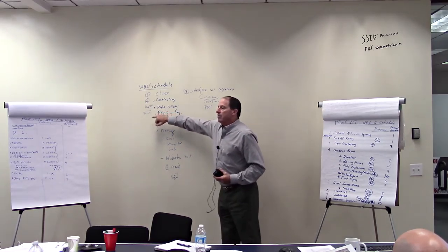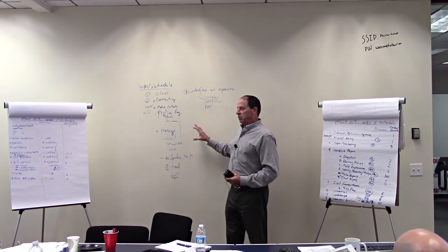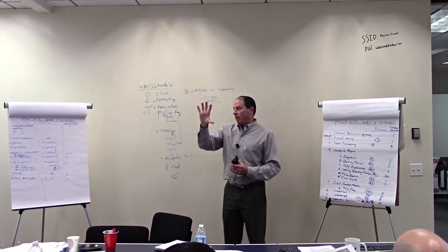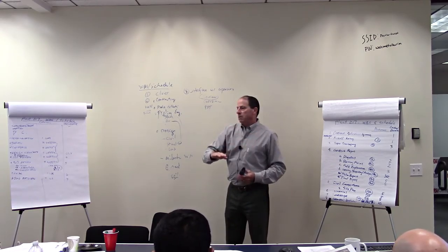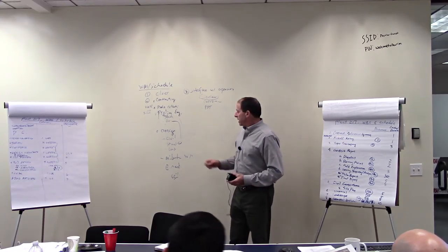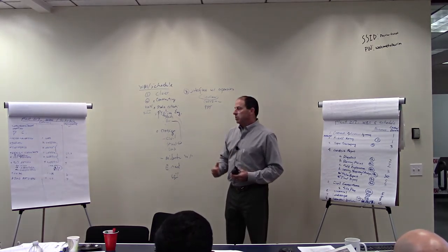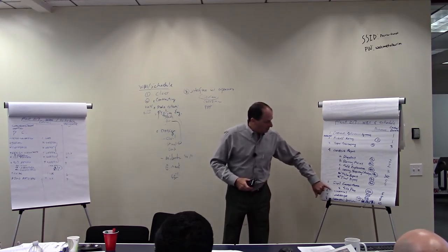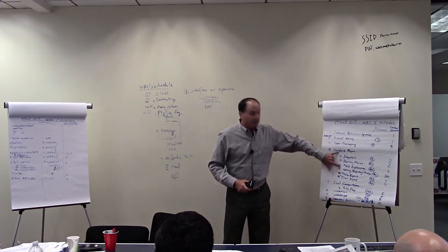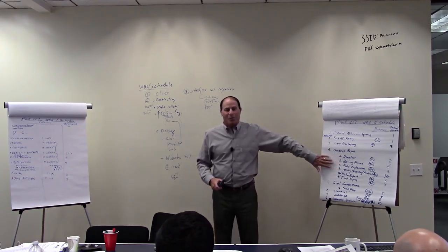The other thing I do, although this is more job to job, is you could say preliminary engineering and put all that stuff together. But I sometimes like to highlight our work out from our subs. So how do you do that? Well, you might say field investigations, and under that, you might have topo and geotech. So now you can get to civil structural activities or concept memos so that we're singled out. We still show all that stuff with its own bar chart like Peter suggested, because I think that was an important point, the blocks, and they can fluctuate a little bit from one to the next. But to explain what we're doing for our own work, I think is where we're really going to sell the client a little bit.